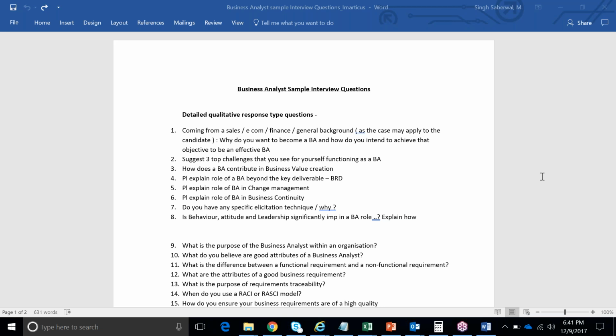Now also one of the reasons why change management is not very significant in agile is that the larger requirements are all broken down into simpler requirements. Since each particular requirement at a line item is rather small, within the life cycle of development of the requirement itself, the user gets acquainted with the impact and implication of that change in the system. And of course, agile is a model where users are very closely involved, much more than in waterfall, in terms of conceptual requirements and its execution and development. So if they are anyways your close buddy throughout the development life cycle, then obviously they are fairly acquainted with how this functionality is going to reflect itself in the system, and hence the so-called change management